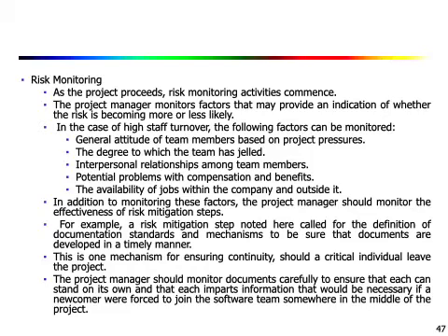In addition to monitoring these factors, the project manager should monitor the effectiveness of risk mitigation steps also. For example, a risk mitigation step that was noted was the definition of documentation standards and mechanisms to be sure that the documents are developed in a timely manner. So that was a mitigation step, and the project manager has to monitor the effectiveness of that step.